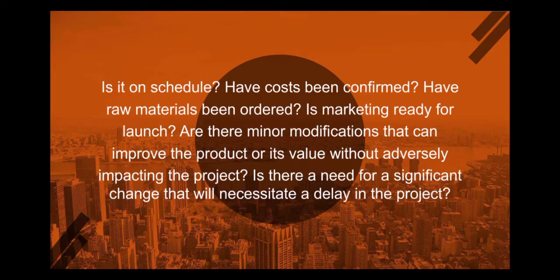If all these questions can be answered positively, the product specification should be frozen and the screening committee should sign up to indicate their acceptance of the specifications. Then the project is ready to move to the next stage, the pre-launch.